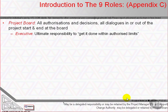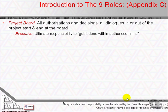The project board is made up of three individual roles. The executive is ultimately responsible for the project. Supported by the senior user and the senior supplier, the executive's role is to ensure that the project is focused throughout its life on achieving its objectives and delivering a product that will achieve the forecast benefits. The executive has to ensure that the project gives value for money, ensuring a cost-conscious approach that balances the demands of the business, the users and the suppliers.